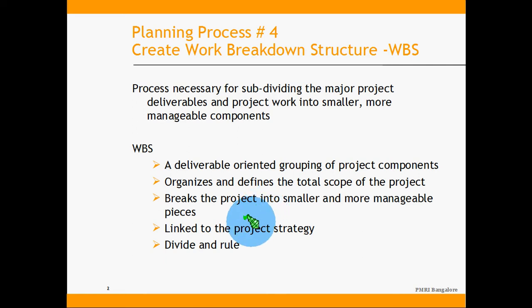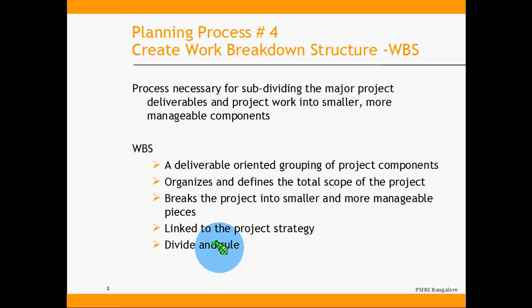The WBS is linked to the project strategy — while doing a WBS, a project execution strategy also evolves. You decide what things should be done in-house, what should be subcontracted outside, and where external consultants are needed. So along with the WBS, a project strategy also evolves, and it is based on divide and rule.